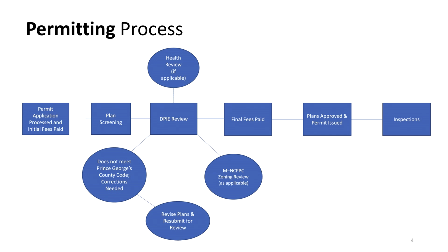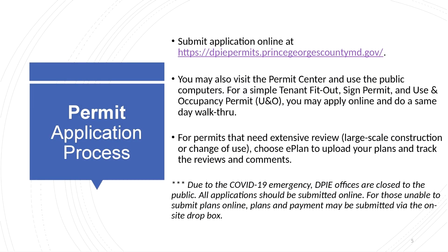You must schedule an inspection. If over $200,000, a third-party inspection is mandatory. Schedule inspections by calling it in. Please have the approved plans with you on site at all times, and especially when the inspector arrives for an inspection. They cannot be with the architect or one of your engineers.